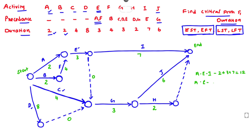Path A–E–G–J: 2 + 3 + 3 + 6 = 14 days. Path B–F–E–I: B = 2, plus F = 4 gives 6, plus E = 3 gives 9, plus I = 3 gives 12 days. Path B–F–E–G–J: 2 + 4 = 6, plus 3 = 9, plus 3 = 12, plus 6 = 18 days.